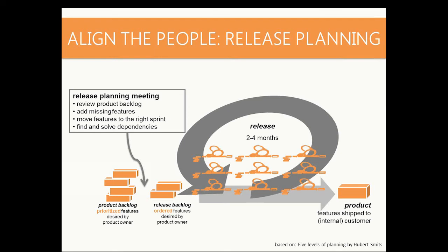In the example of the insurance company and the Mendoza teams, all those 30 people were in a virtual meeting for a couple of hours to structure all those stories on their claims processing backlog. But that's what's happening in release planning, and I find that very helpful in getting a good flow of work through all of the teams. Does that work for you, Fernando? Yeah, absolutely.